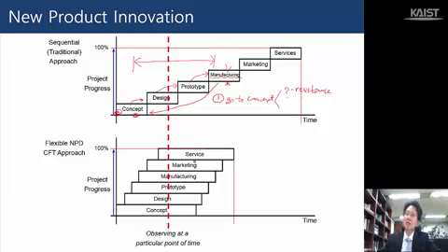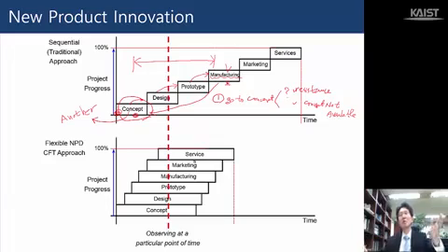There are some other practical issues as well, because this is a sequential approach. Once the concept finishes its work for this particular project, the concept people will move to another project, right? So even if we go back to the concept, probably the original concept developers are not available, maybe, right? It's pretty possible. They work on other projects, or it was a long time ago, therefore they don't remember anything. That may happen.